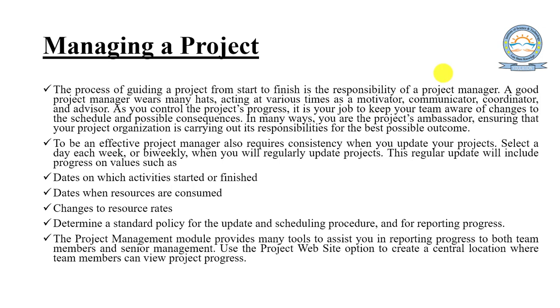To be an effective project manager, you also require consistency when you update your projects. Select a day each week or bi-weekly when you will regularly update the project. This regular update will include progress on values such as dates on which activities started or finished, dates when resources are consumed, and changes to resource rates. Determine a standard policy for update and scheduling procedures, and for reporting progress.